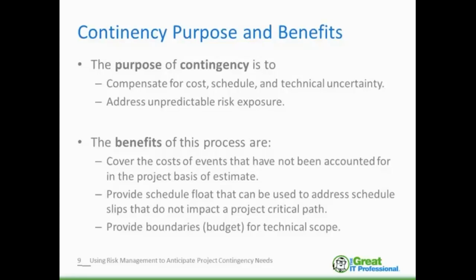A budget contingency is an amount of funding that is usually held within the project, but not allocated to the work packages. It is specifically meant to cover risk, either to reduce risk or to manage it once it occurs. So knowns, which you're mitigating, and unknowns, which you are managing once they occur.